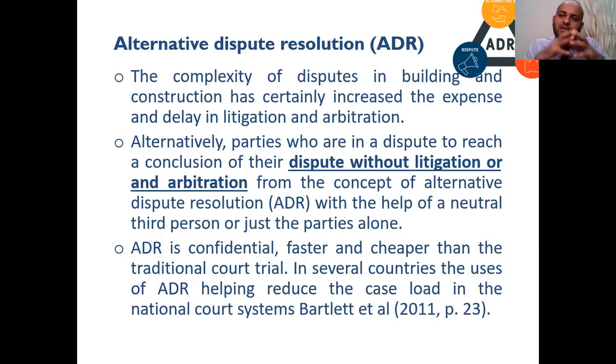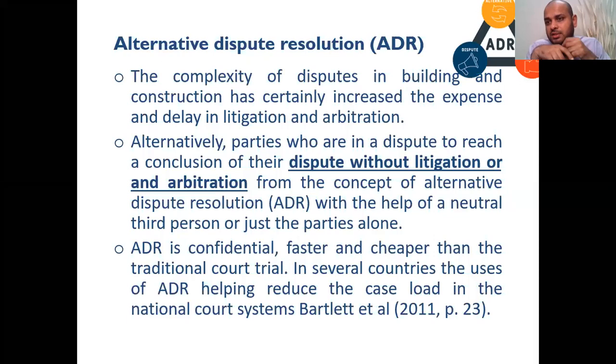If you look at GCC countries as well, they are now introducing steps before you go to court. You cannot directly go and file a case, mainly in construction contracts. You should follow some procedure. They are trying to introduce some negotiation in the initial stage. If you fail on that, then only can you reach the judge. You can go to court or register a case, but you can only reach the judge after the steps.